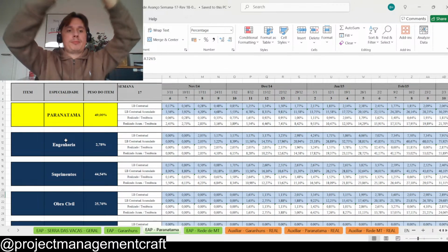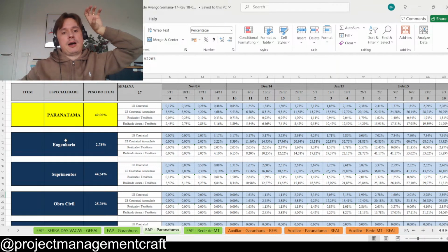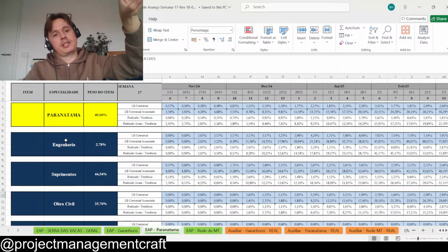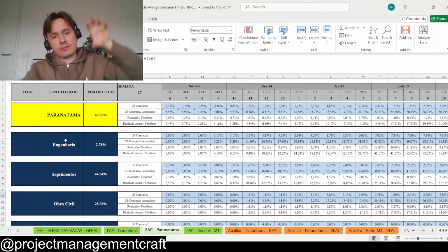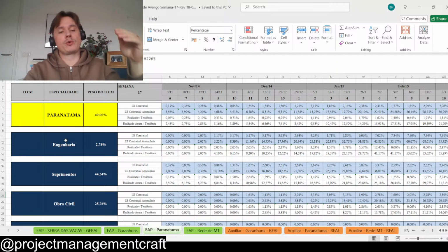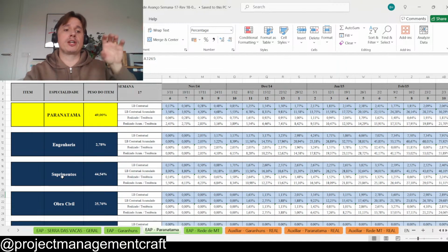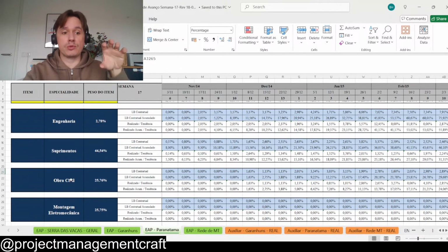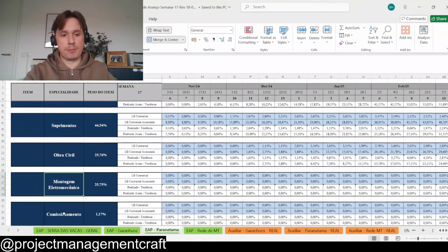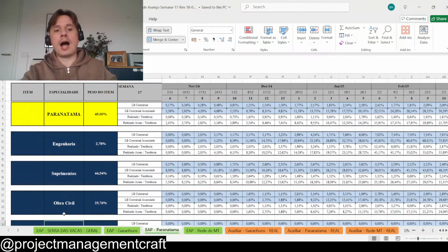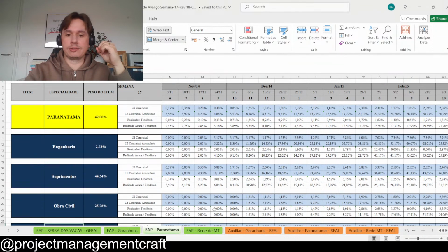So you have the main project, then you have a breakdown from one substation, a breakdown for other substations for other big packages. So you break down the smaller packages there. And each of those packages was further broken down into engineering, procurement, construction in general, and the construction itself was broken down into civil construction, assembly, and commissioning part there. How do you create something like that? So let me go into the details.